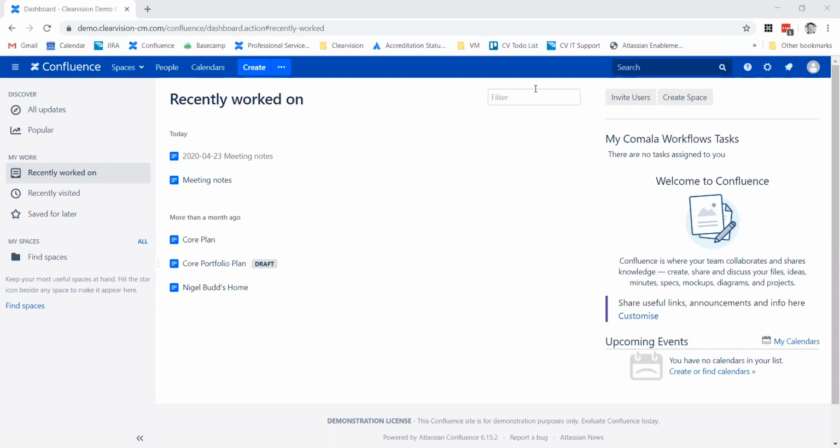And the idea of this requirements template is that you capture a lot of the information or the background of why you need this item of work developed first in something like Confluence, so you can start refining it and discussing it with your team before you include it in Jira as an epic or break it down into stories